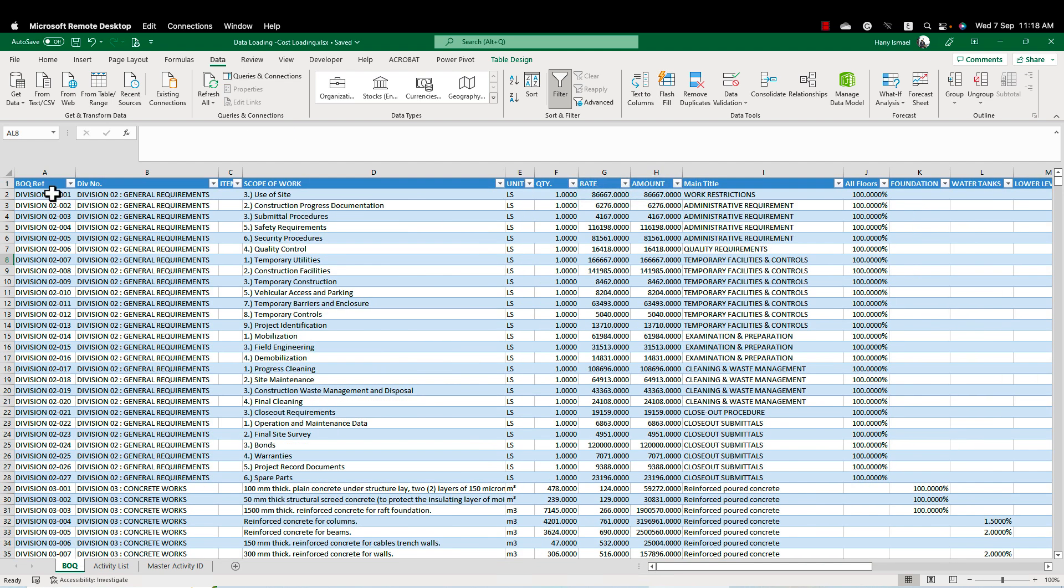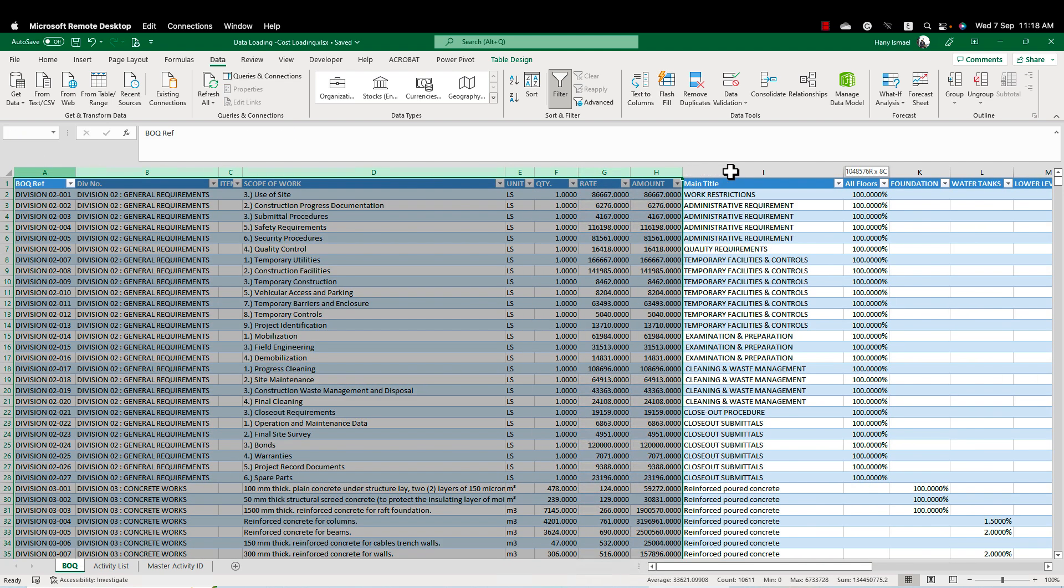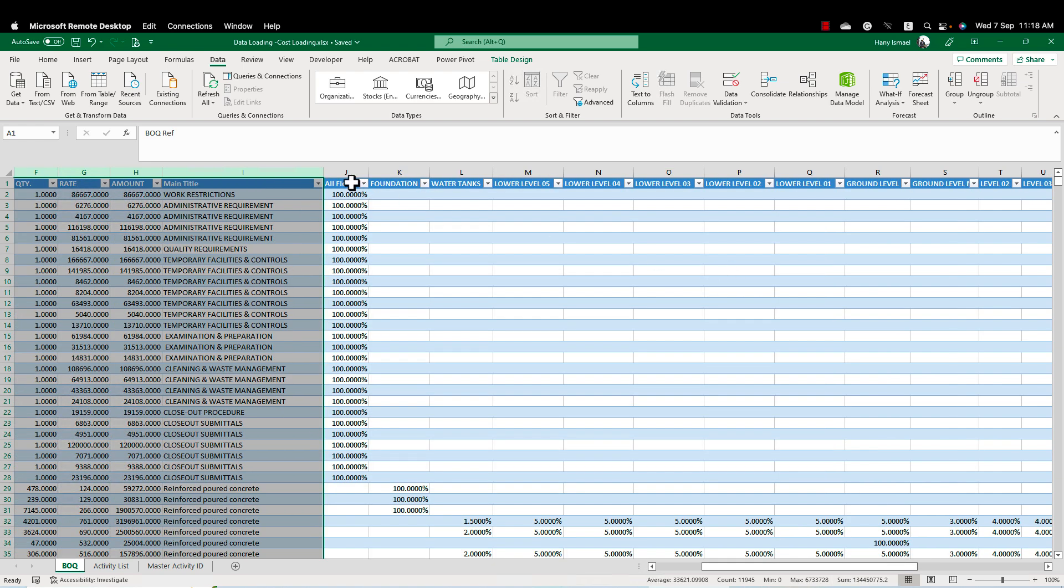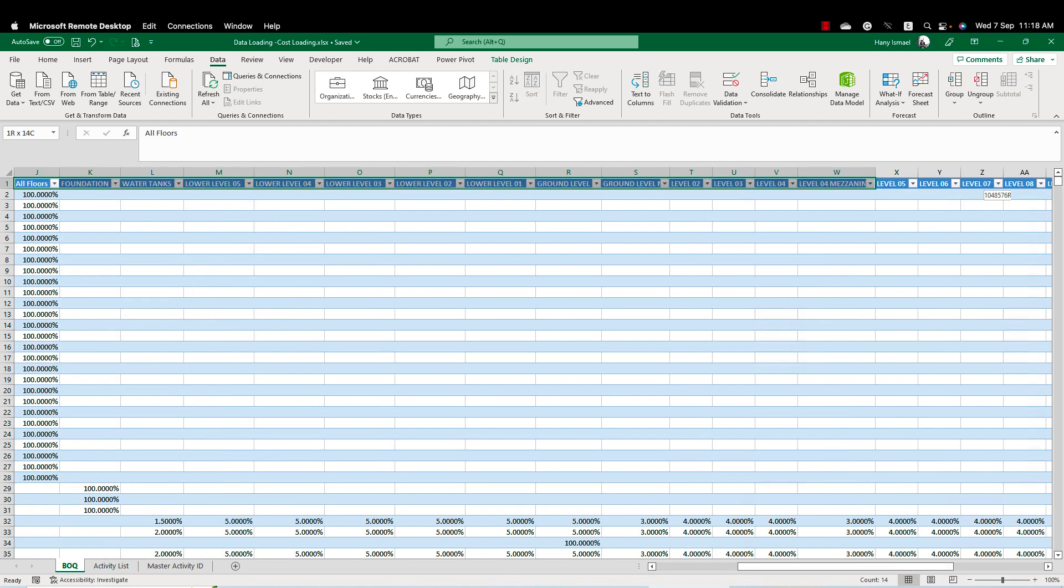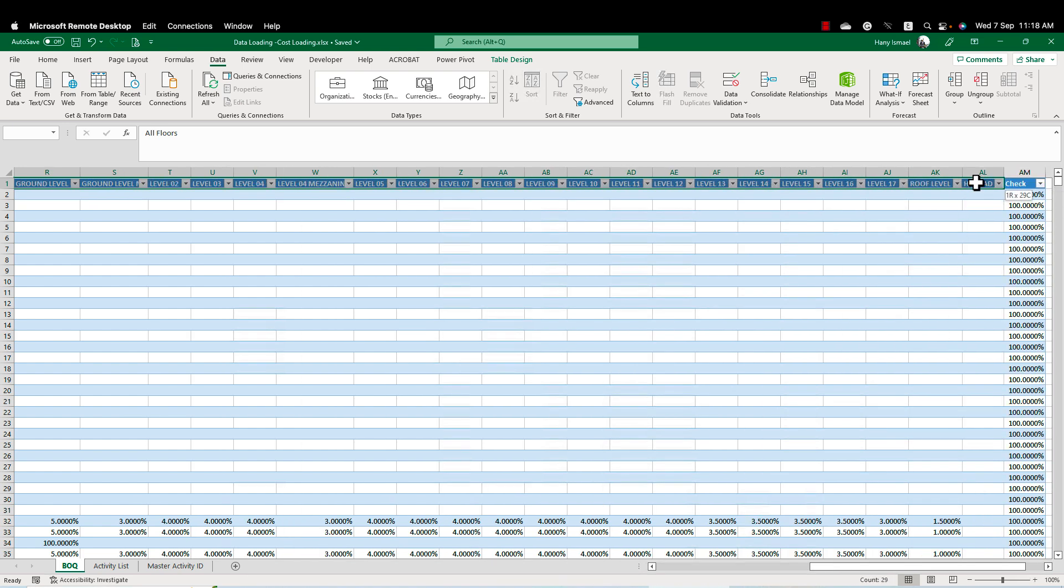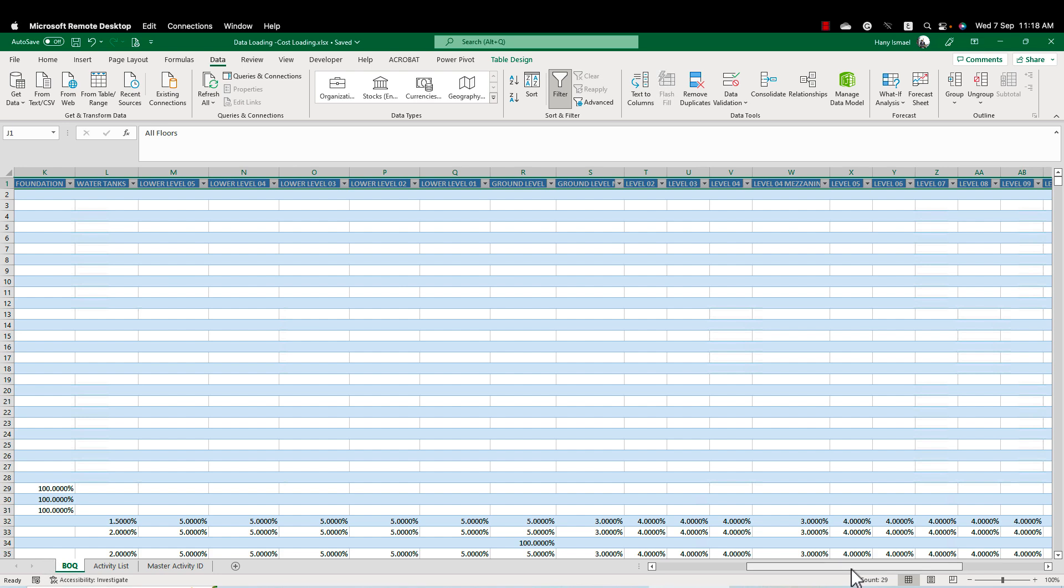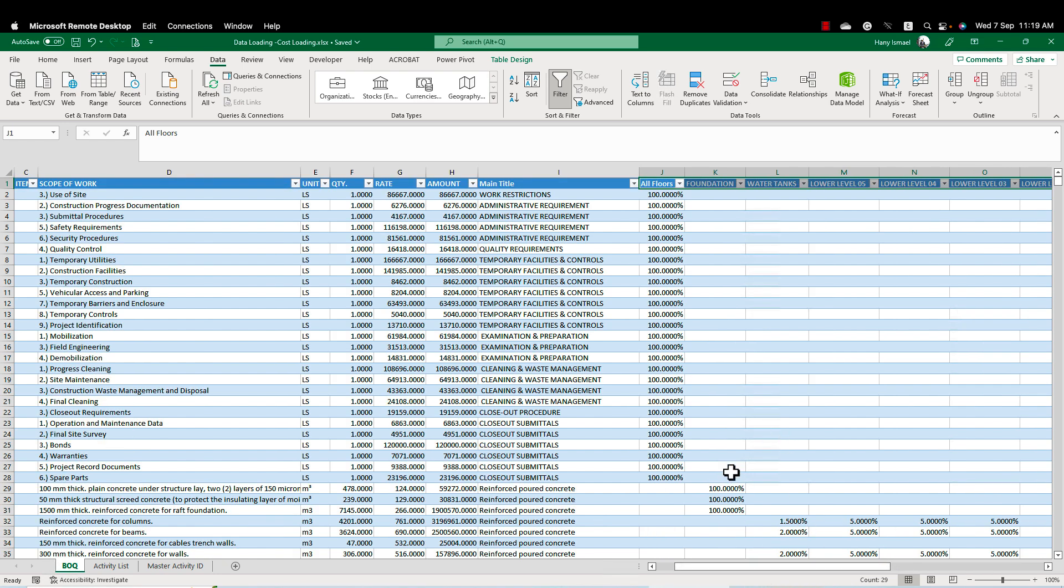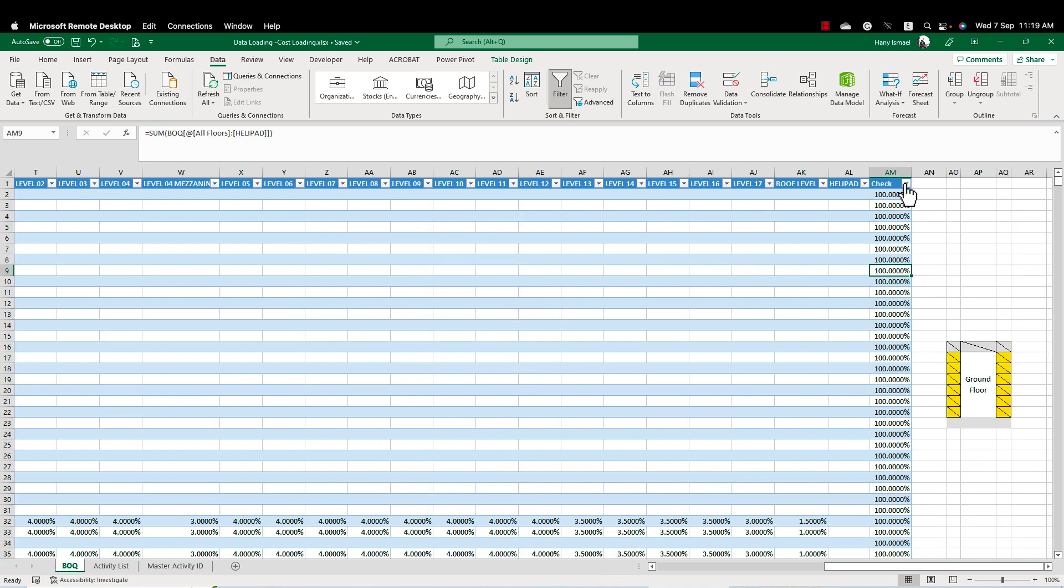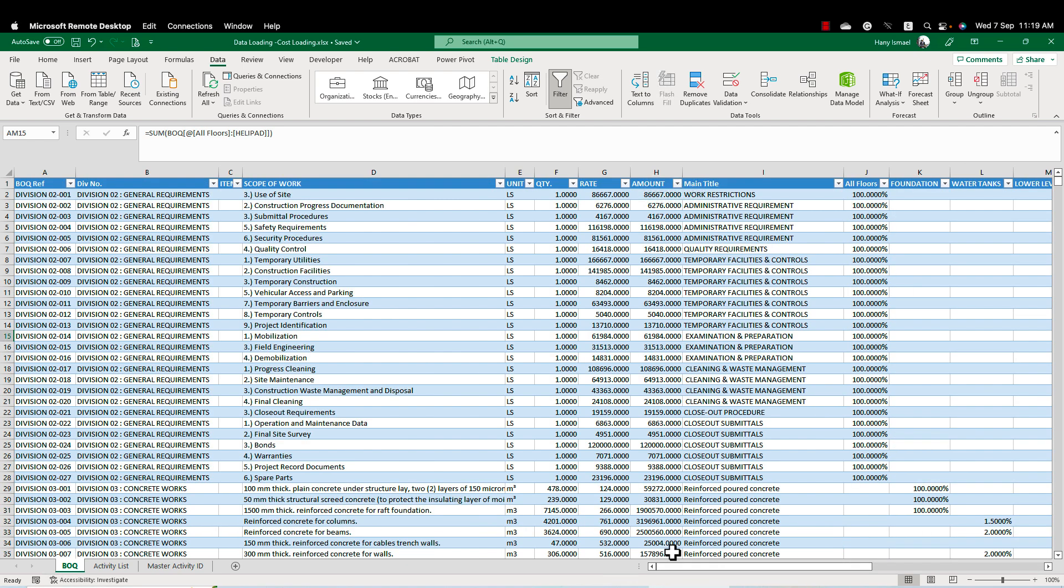The second sheet here, I have same as the previous one, but in that case, I have a high rise building and this building has some floors. So I would like to put a percentage for each floor. I put here my floors and I put a percentage for every BOQ item.